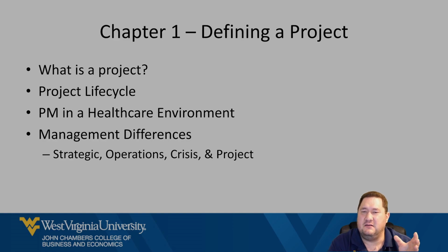But we move on in the life cycle, and eventually we actually start the project. So we usually have the initiation, where the project is still in its infancy. A charter is developed, which is kind of a broad outline of what the project's going to do. This is your budget, this is your team, this is the project manager, this is your sponsor, or the executive, or maybe a program manager that's there to help you should you need it, like remove obstacles, barriers, and stuff like that. And then we move on into a planning phase where most of those documents are created, the communication plan, the work breakdown structure, and all that.